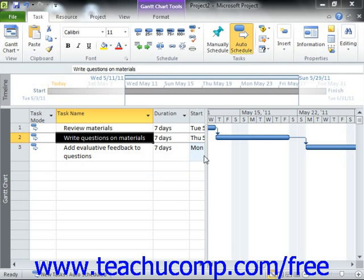You can also create semi-flexible constraints, which allow for task scheduling within a date boundary that you choose. For example, setting a "start no earlier than" constraint will allow your task to be scheduled any time after a specified date has passed. This is an example of using a semi-flexible constraint.